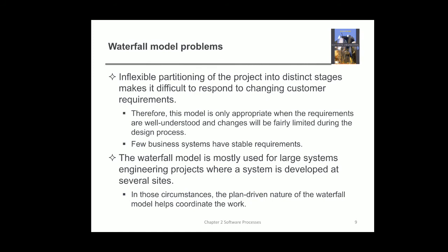Apart from that, there are a lot of problems. One is that inflexible partitioning of the project into distinct stages makes it difficult to respond to changing customer requirements. Here, one problem is we cannot divide the project into multiple stages. And another thing is, if there is any problem in the previous stage, then it cannot be repaired in the next stage. What we have to do is follow all the steps, go to the last phase, that is operation and maintenance, and then rectify the things.